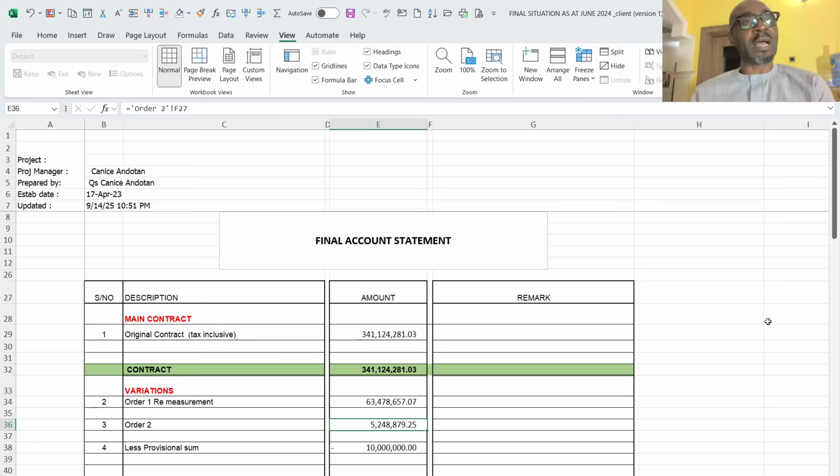So the amount that will be agreed upon has to be paid for. So it's an additional cost. Then you have fluctuation. If it is a fluctuating contract and the client has to pay for the differentials in the price, then all of those have to be captured.